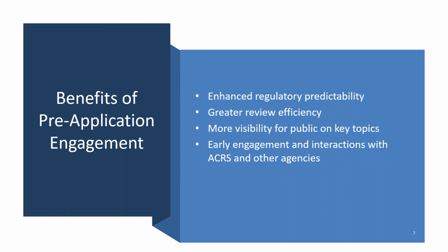In addition, bringing forward those specific issues during pre-application allows us to engage with ACRS and other agencies on key topics that would otherwise have to be handled during the review of the application, and in some cases challenge or even affect review schedules.